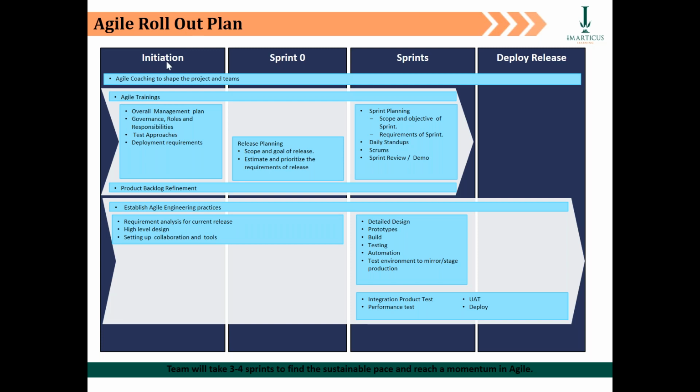Because remember, in the planning phase, we will say, we have to develop so and so scope of this product. Okay. These are 18 features that we have to develop. First, we have to pull up teams which will take up individual features, which we will say, let's say we have 3 sprint teams. There are a total of 18 features. We will give 6 features to each of the sprint teams. They will be like-minded features so that we are able to club that like-mindedness of the design, coding, testing into the same feature team. So that's how we will split them into sprints.